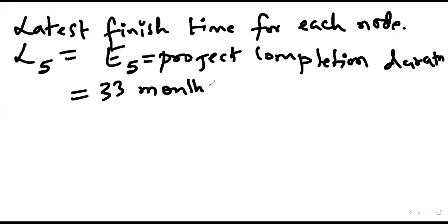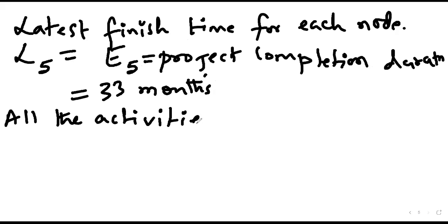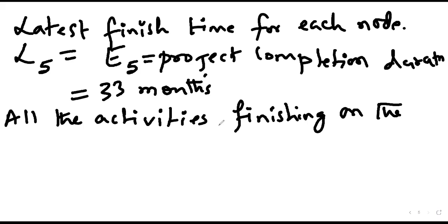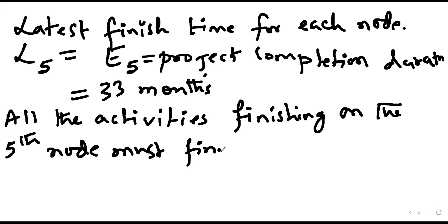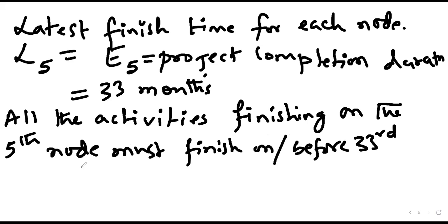That means all the activities finishing on the fifth node must finish on or before the 33rd month. This is the definition for L5.